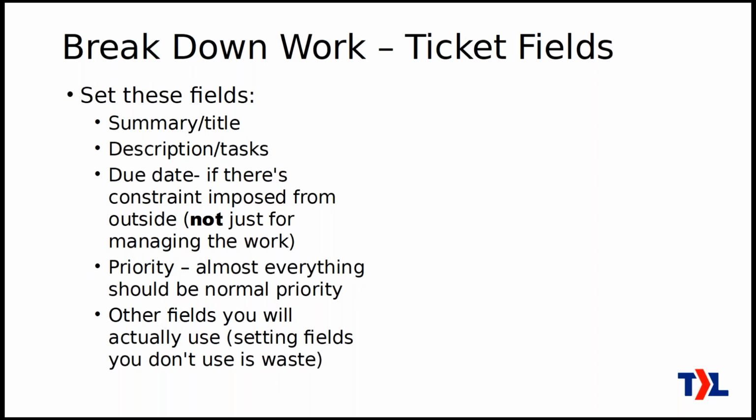It's only going to be if, for example, that particular part of the work needs to be done because there's a regulatory change that this project is for, and it comes into effect at a certain date, or maybe there's a conference that starts on a certain date, or the work is for an RFP and that has a due date. Something like that. That's what you're going to set the due date for.